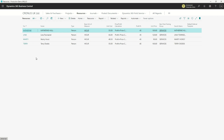Moving inventory from my warehouse to issue as part of the project, I create a project journal. I can do the same for general ledger accounts in a third-party outsourcing situation — I create a project journal to bring that in as a cost against a task of my project. And if I buy something specifically for a project, I raise a purchase order on the system, specifying it's for a particular task of project number 30 or 20. When those goods are receipted, it posts automatically through a journal against the project.